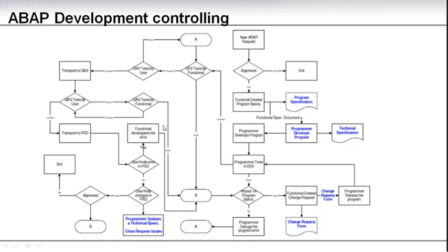Now I know in your project you might want to break this down, and you'll say we do this by the functional, and then this step is UAT, and it's done together for all of the development. But you can use this flowchart for every single development where you have a problem. You can go through this flowchart, and it's a good idea to do. So the end goal is, of course, that we get it into production. So the user finds an error in production, no changes in production, and then close the request. There's no errors, there's no change, you close the request.